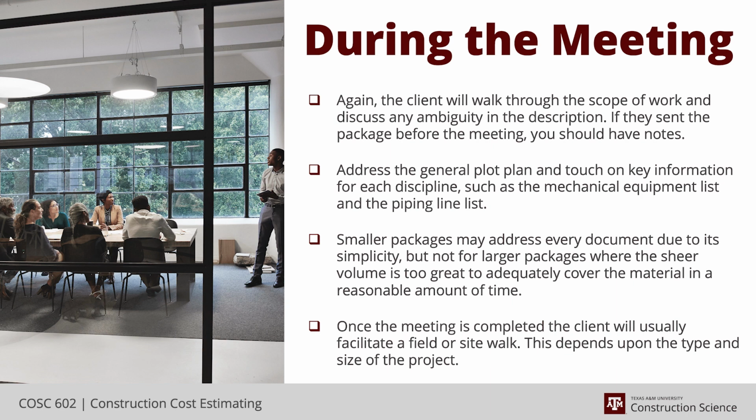and take as many notes as you can as you're walking through, and you're trying to identify, because you have a plot plan in the package they gave you, a mechanical equipment list. They'll give you all the piping isometrics, so you're absorbing as you're walking through the plant, and you're looking for interferences, access, congestion, overhead, obstructions. Do you need chemical suits?